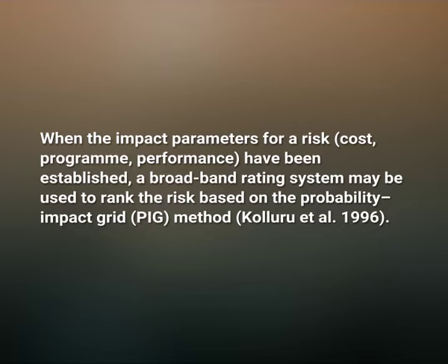Another technique is probability impact grid analysis. When the impact parameter of a risk, cost, program performance have been established, a broad band rating system may be used to rank the risk based on the probability impact grid, called the PIG method, developed by Kolaru et al. 1996.